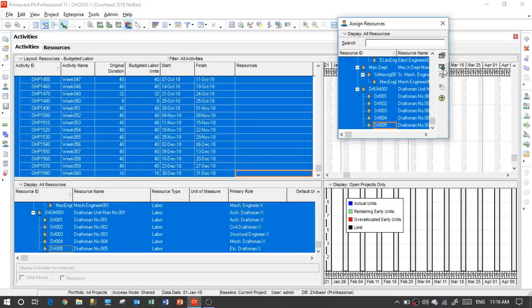However, I need to highlight that the KPI for the overhead is not to be taken alone, because we also have to take it with the other hours assigned to the other projects, because the other projects will cover the cost of the overhead inside them to a certain limit. So the overall management of this resource might indicate, with both KPIs, that this resource covered its cost and profit. Okay? Of course, the aim of any organization is zero booking in the overhead.